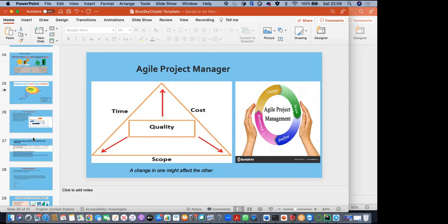And you tell them, guys, if 10,000 is all that you have for this product, then it's only going to give you X. And to be honest, we may not need to spend 3 months doing X. Perhaps 1.5 months will be sufficient, or 2 months at the maximum. Can you see that the timeline has changed? Because of the budget.